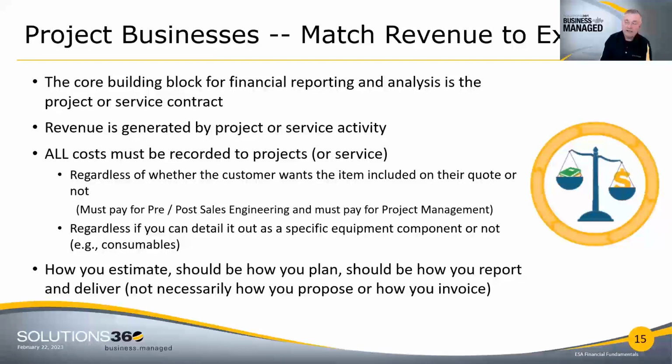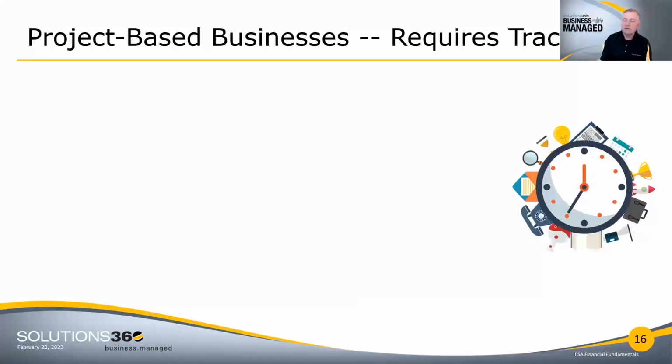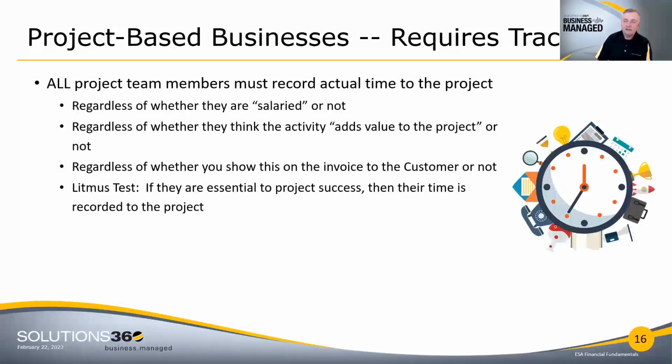And because of that, I'm now going to really get on my soapbox and talk about the two key activities that you have to get right in a project-based business. Number one, you have to track your costs. And this is, in most of our businesses, time. So our time, our payroll, as it's used on our projects, is the most important contributing factor to understanding the true profitability of our projects.